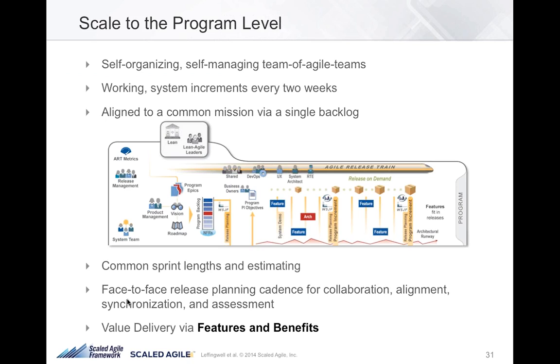So it's not enough that the team has good working software. It has to work at the system level, and we try to do that through a pull event called the system demo. Hey everybody, demo's coming up. Let's grab your code. Let's pull it in. Let's make sure that it's integrated, and let's work together to make sure that we have a system.